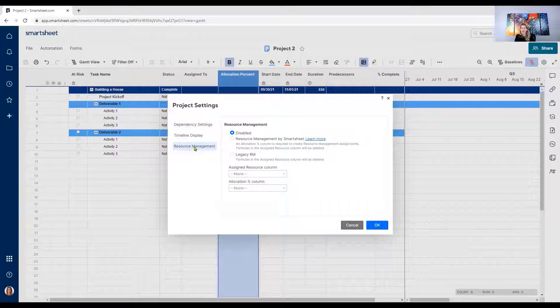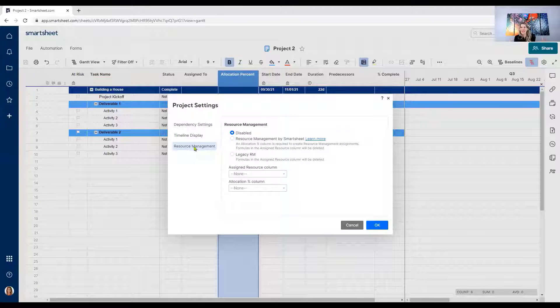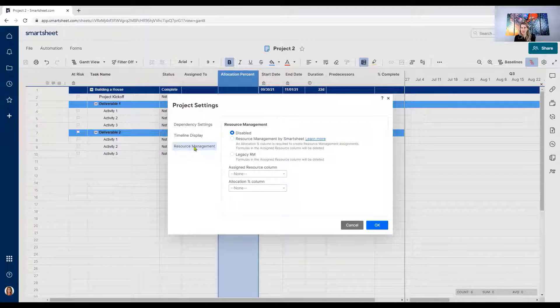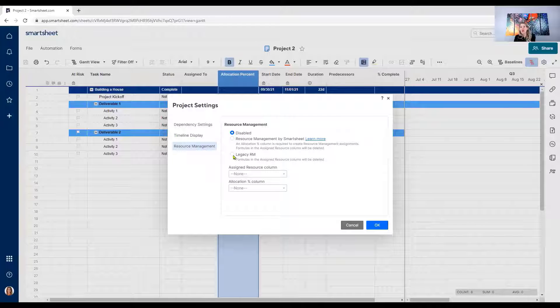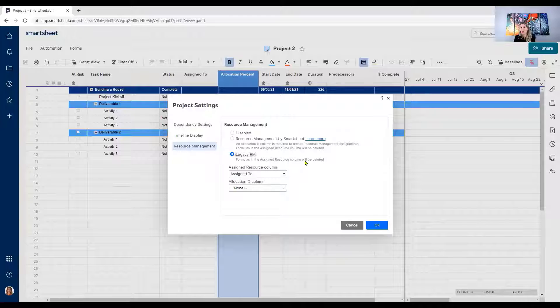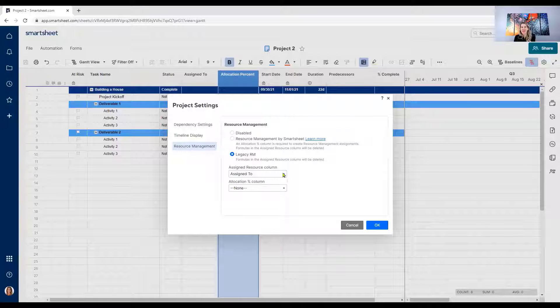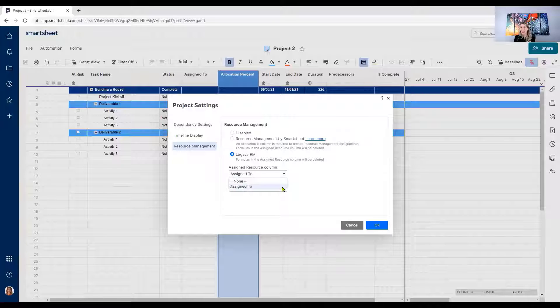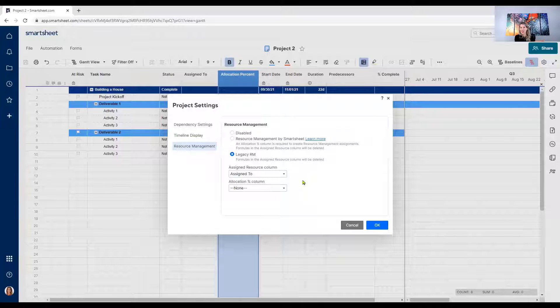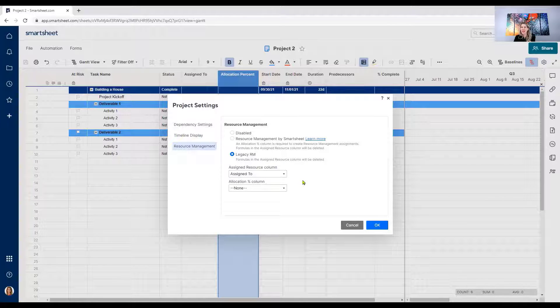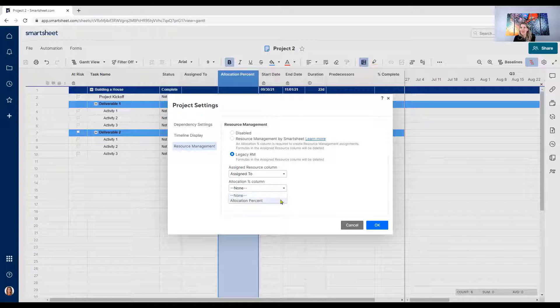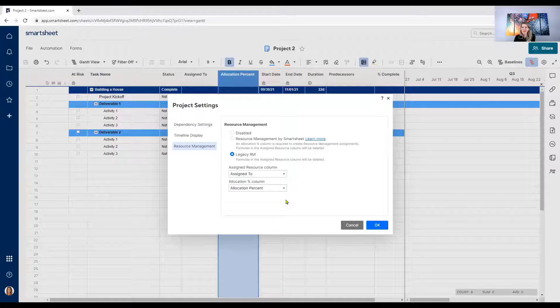When I click on resource management, you're going to see that it is disabled. So it's currently disabled. We talked about legacy resource management. That's what we're focusing on right now. So I want to go ahead and click on legacy resource management here. It's the third option down. And what it's going to ask me is which column is my assigned resource linked to. You'll see that it's defaulting to assigned to because that's the only column that I have people assigned to on those particular rows. So assigned to and then allocation percent column. I'm going to select allocation percent. I'm going to click OK.